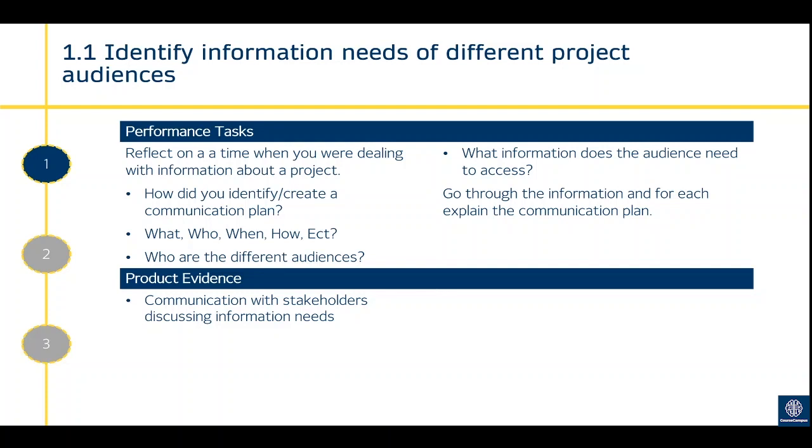Some stakeholders are familiar with project management methodology and some aren't, so those who are can get the detailed project management information. Those who aren't might require that information to be changed or adapted in a way that they'll understand it. Some stakeholders might have access to computers, some might not. So if you've got, for example, a tradesperson who's responsible for carrying out a task or activity, they might not necessarily have access to a computer if they're on site, so perhaps that would require a paper folder to be produced with the plans in place, and it can be communicated that way. So those are some examples.